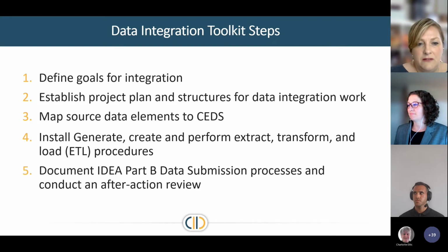And then step 5 is the last, but it's also very, very important for sustainability, where you document all of the new data submission processes that have been created by adding Generate and by needing to maintain your maps and needing to maintain your ETLs and conducting an after action review. We have after action reviews built throughout the toolkit, and it's so important to take an active role learning from how you're working and from lessons that you're learning along the way. So those are the 5 steps.